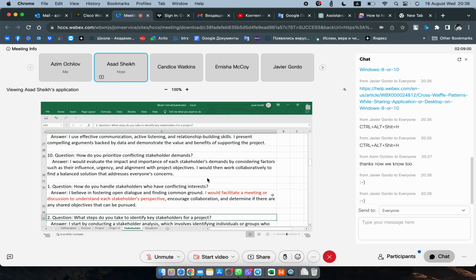Sometimes you can say no, we cannot do it. And then in Agile, if you cannot do it, what's the recourse? You can tell the stakeholder, because of time constraints, if that's one of the answers, the feature that they requested will not be included in that sprint. It will not be included because you have a fixed time, 2 to 4 weeks. It'll probably be included in the next sprint. So that would be the answer there.